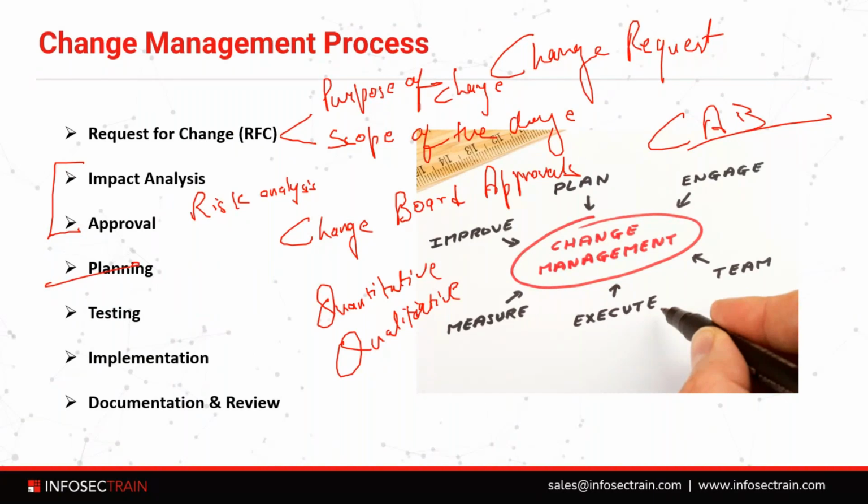Then you will be planning for the change, what things you will need for the change. Then you will plan the rollback plan, that during the change, if you are making changes to the infrastructure, you are making changes to any services, if something bad happens, do we have enough ways to roll back to the older one which we are currently using? So that is the planning part.